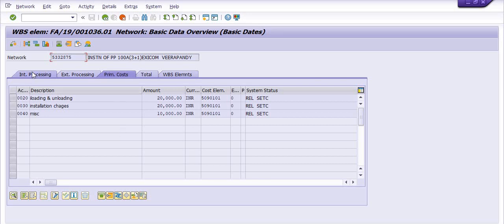For test purposes, installation charges and miscellaneous charges have been planned under the prime cost head. Under network activity: line number 10 is material planning, line number 20 is loading and unloading charges, line number 30 is installation charges, and line number 40 is miscellaneous charges. For material planning, we do the MEGO activity — issuing material from our storage location to the project — then consume and capitalize it, booking capitalization charges in assets.